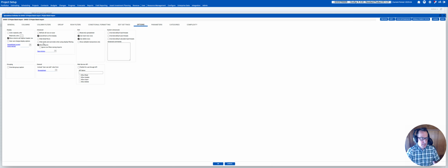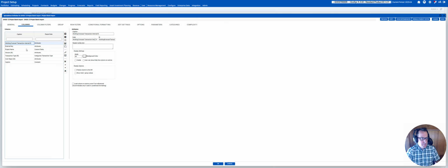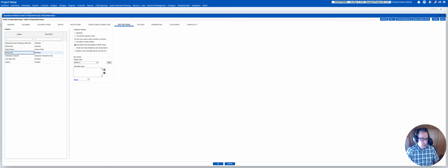We've turned on allow imports, and we have this hidden column and this hidden column, and this is what's capturing the name. I am putting them all in. I made a dedicated version for this endeavor, again called Ghost-13. And when we import these WFTs, they're all getting stamped with that version.